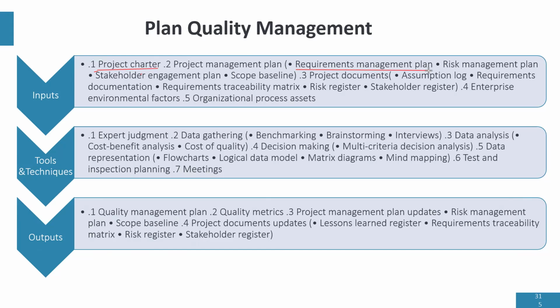So the requirements management plan governs how requirements are collected and managed throughout the project. The risk management plan shows how risks are going to be managed in the project. And the stakeholder engagement plan shows how we're going to engage stakeholders in order to ensure that their quality needs are met. Stakeholder engagement could come in the form of having workshops or interviews with stakeholders to actually understand their needs.